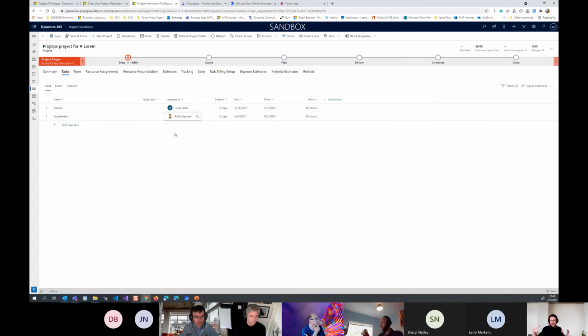So what I did here is I booked myself on this implementation project. The system wasn't able to say for certain that I want to be on this task, so it just booked me on the project. And as a PM, I had to come in and say, all right, Anti's going to be doing this task, so I'll assign him on this task. So I now have a booking and an assignment.